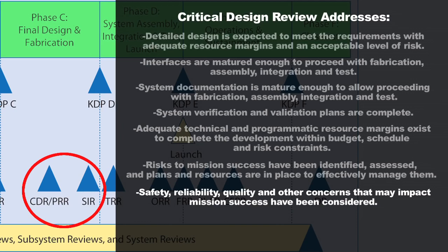But what'll happen is that'll have to go through a review cycle of its own to make sure that every one of the stakeholders approves that, yes, you can buy some of this material early, because it really is critical to do early, and the requirements in that area are pretty well defined, and we assume it would be safe for you to go ahead and buy those things early. Otherwise, the critical design review is really that key review where after that review, you're kind of given the go-ahead to buy all of the rest of the components.